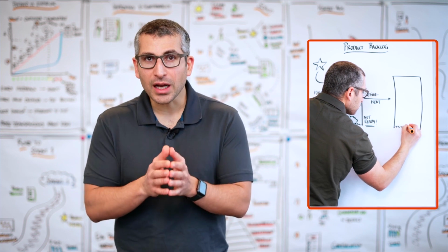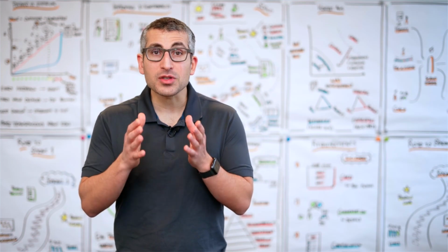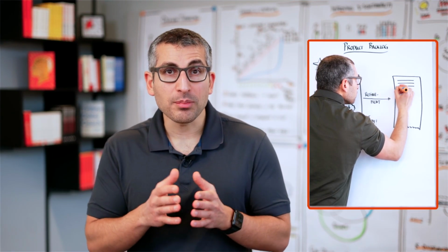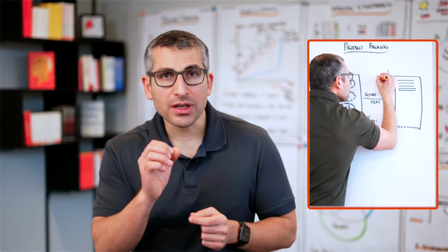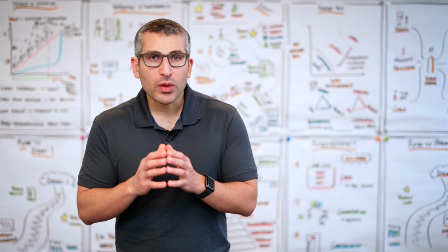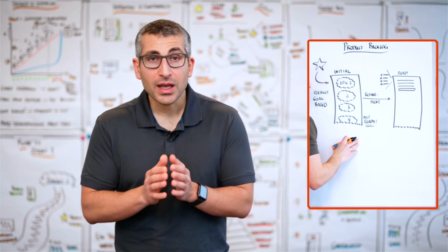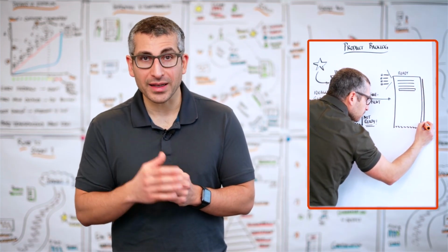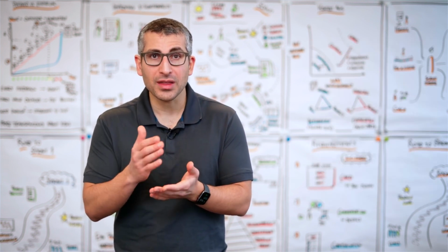That conversation not only results in adding acceptance criteria to items, but also making these items smaller in themselves. Whenever you're writing down acceptance criteria and you have multiple ands or ors as part of your acceptance criteria, it's a pretty good clue that you can make a cut and make that specific item smaller. So when we look at a ready product backlog, we want it to have the following characteristics. It should be A, prioritized, which means the most important or most valuable items should be at the top, while we account for technical dependencies between the items.